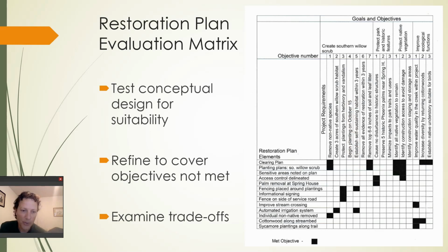So what you'll do is you ask your team member or your consultant to go back and revise the restoration plan such that it does address all of these gaps. And you make sure it's complete before you move on to project implementation, before you seek funding, before you seek permits. So this is one of those stages where quality control is very important.